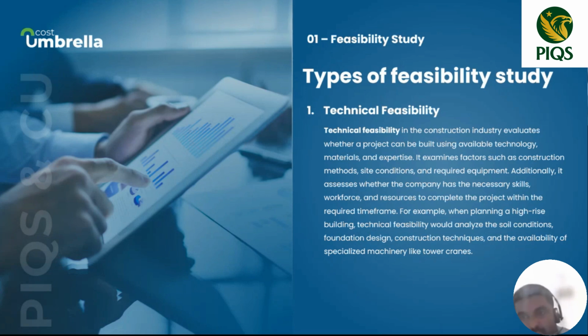It can be a required equipment. We have to check, okay, for that construction, whether we have the required equipment, enough labor resources, enough skills, enough technology. So this checkup, right? When you get a design, before moving further to develop the design or execution, you have to check to make this design happen. Are we technically capable? That simple analysis is known as technical feasibility study.